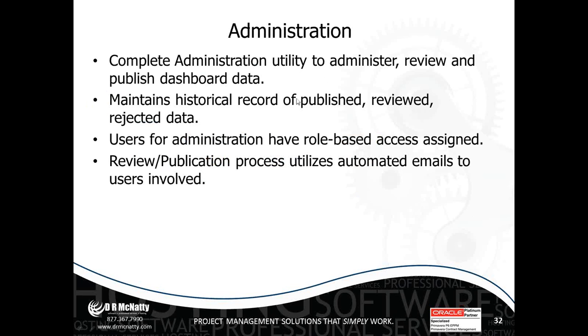The administration of the dashboard allows an administrator and publishers to review and publish the dashboard data. It maintains a historical record, so everything that's been published is saved, so it can be audited in the future if needed. There's role-based administration that only allows certain people to have certain rights as to what they perform, and it uses emails to communicate among those involved to facilitate the review, approval, and publishing process.